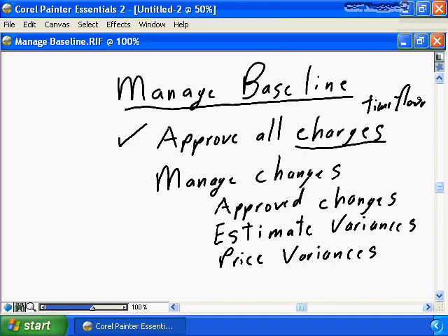Therefore, your cash management plan says, for this month of my project, I need to be prepared to spend $20,000 for this material. And you look at your accounting sheets at the end of the month and the charges aren't in there. You need to go looking for it to ensure that the invoice has been received. And if the invoice has been received, that it's not sitting idle on someone's desk awaiting approval, or that it hasn't been inappropriately coded, and that the charge is put onto your project in the month that you're expecting it to be charged to your project, as opposed to showing up 2, 3, 4, 5 months later when it finally gets properly coded, and by then your vendor is very annoyed because they've been waiting for payment.